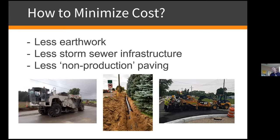So that smaller footprint, if they can do that type of work within a half day with their labor and their force, so they come there in the afternoon or start there in the morning and then go to another job site, they're able to bill their crew to another job for that day. But if it goes over a half day, they're going to charge you for a full day, even though maybe you only did 6 hours. So from that standpoint, try to keep it within that smaller footprint if you can, which will give you a better deal on your asphalt from my perspective.